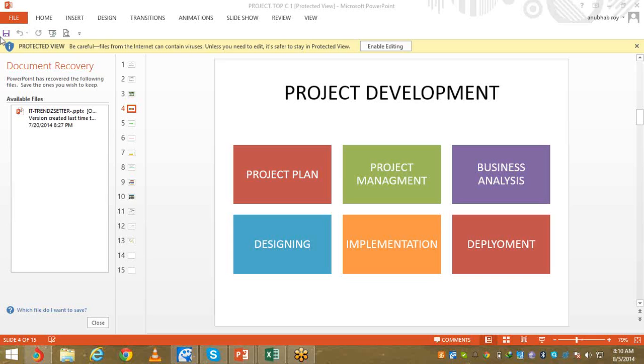You have to report any kind of bugs, mistakes or errors you find, and you have to prepare a test case, as I told you on the first day, and give it to the development team, saying, okay, fine, this is the finished product, but you have to make these few changes. Because when I'm operating this system as a finished product, I'm finding certain errors. So you have to fix these errors, then I go to the client, and the final stage is deployment. After the development team finishes fixing the errors, you check it once again with user acceptance testing, and after that you deploy it. Deployment means you have to deliver to the client.